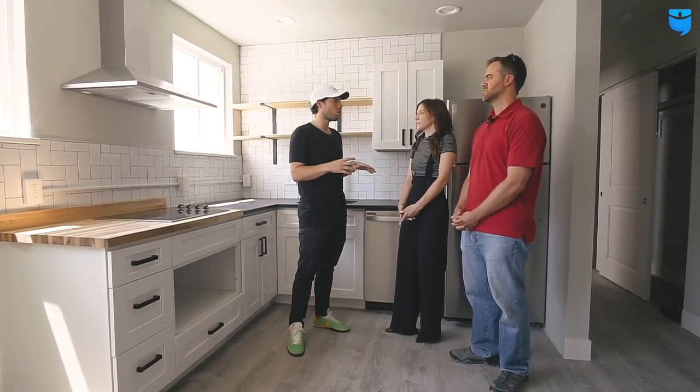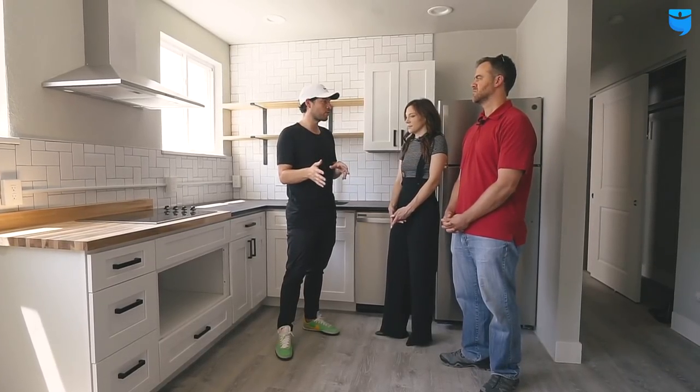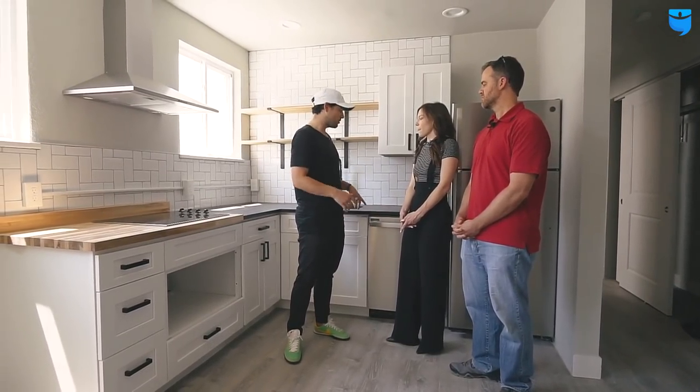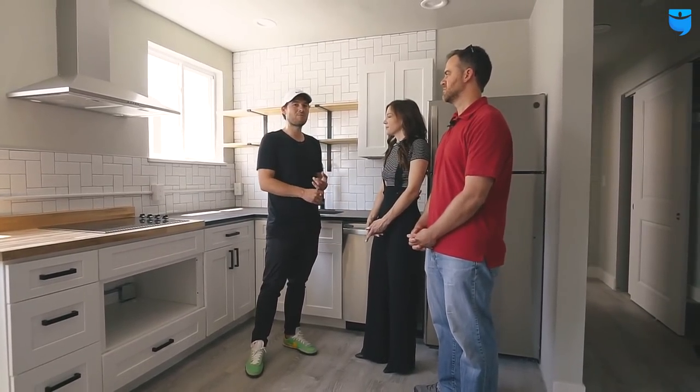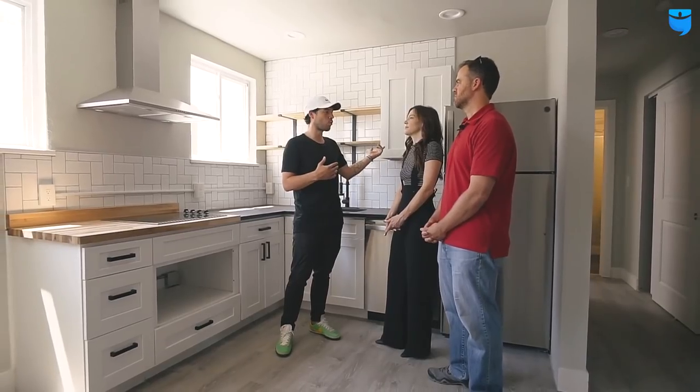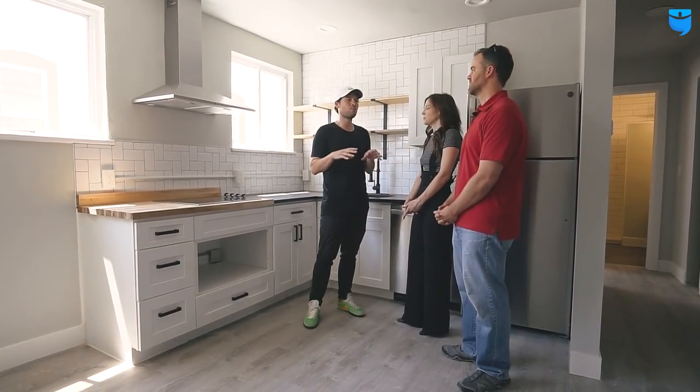On projects that are smaller, what I found is that it's almost better to do it differently. The flooring we will definitely do, and the fixtures, you know, some of the cabinet pulls and those kind of things. But even the plumbing fixtures, I can't tell you how many plumbing fixtures we lost because we ordered them all at once, just because guys end up not caring as much. But what we've done is we'll have the plumber order his fixtures and he's responsible for them. So if he loses them, he has to replace them. If the electrician orders the lights, he's responsible for them.